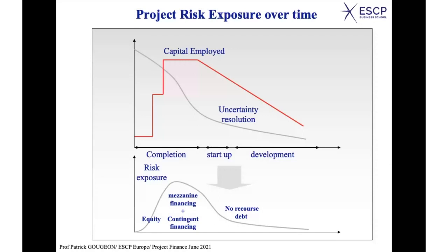Well, this is something you should keep in mind as far as risk is concerned: you have basically two big phases. The early phase with a high risk exposure, which is then resolved, and when you enter the operating phase, that's when the no recourse debt can come in.